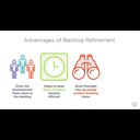And secondly, as I've mentioned before, Dave may place rough estimates on product backlog items in order to better facilitate his long-term planning. These estimates are based only on the relative size of items that the team has estimated prior and are not commitments. The development team always places the final estimate on any item during sprint planning. But it's not unusual for some of these estimates to be wildly different than the actual estimate that the development team assigns to the same item.